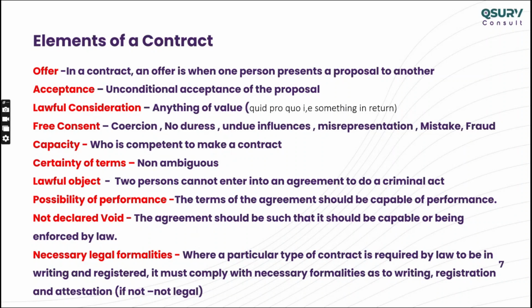There is something called a specific offer, which is very important because in the construction industry we have to give a specific offer. We are giving the offer to the exact company. That is the reason when you prepare the contract, you put their full address, including the PO box. General offer means an open tender.